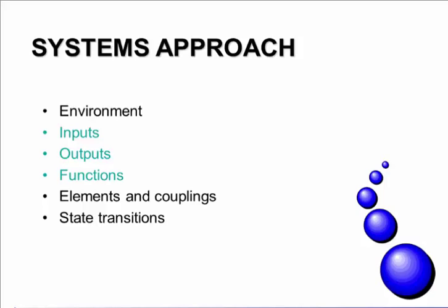They need to define the set of inputs for each path, the outputs, the function of the task, and then how each of the different tasks are interrelated, the couplings and the transitions. So, for instance, if we had the conveyor that we mentioned earlier, then we start off with a series of configurations, which is prior to the system. So we have a configuration.